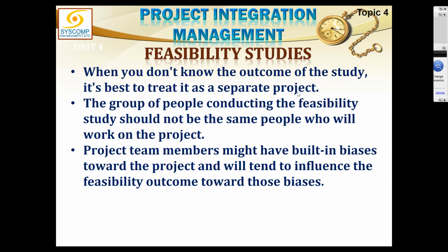I hope you understand the point. If you think that after doing this feasibility, there is a high likelihood that this will not be found feasible, then it is not wise to start it as a big project. Feasibility being the first phase or a sub project, and then moving on to the next phase, there is no next phase if the feasibility doesn't pass. Therefore, if feasibility is so doubtful, you do it as a separate project and don't make it part of the larger project.